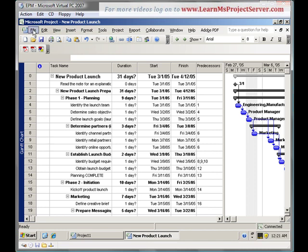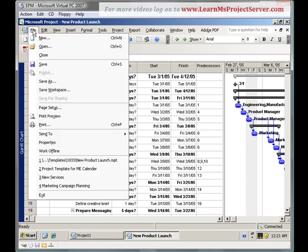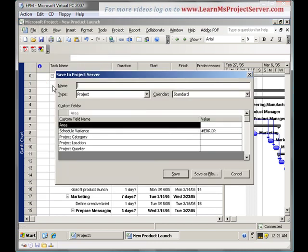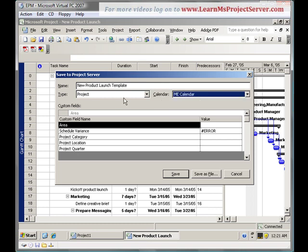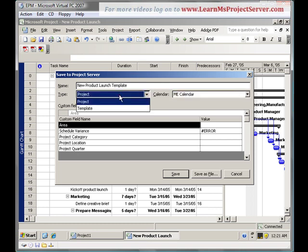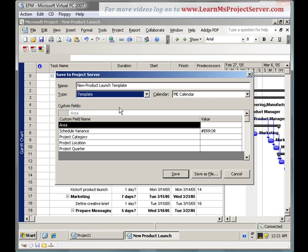I go to file, hit the save as button. It's asking me a name of the project. I say new product launch template. The calendar that I would be using for this is the Middle Eastern calendar. The calendar type of project is a template. And the type is a template. I can provide any values to these project level custom fields. I leave them blank and hit save.